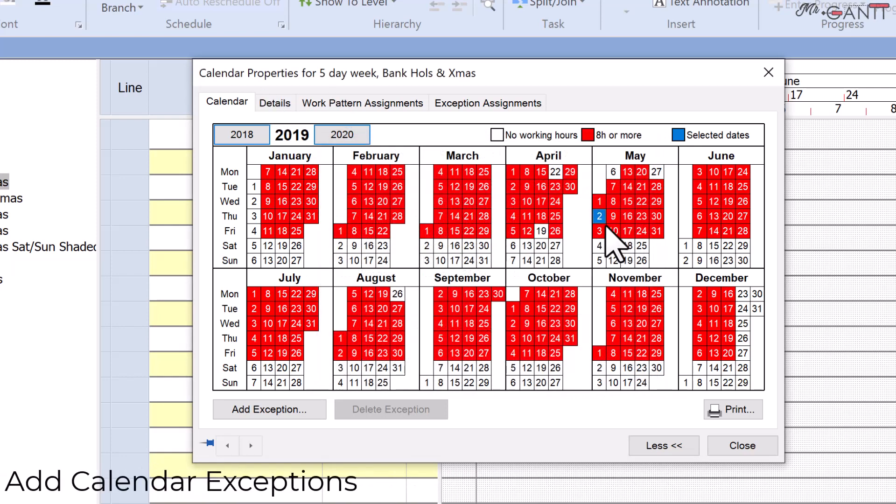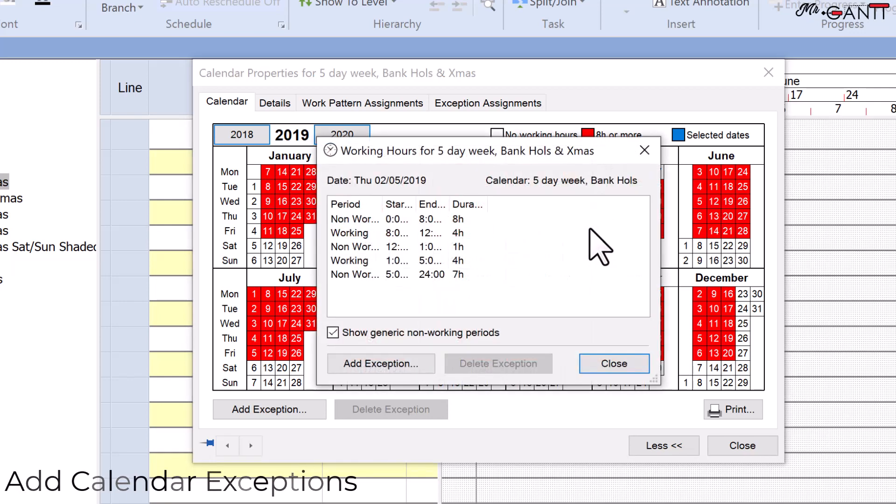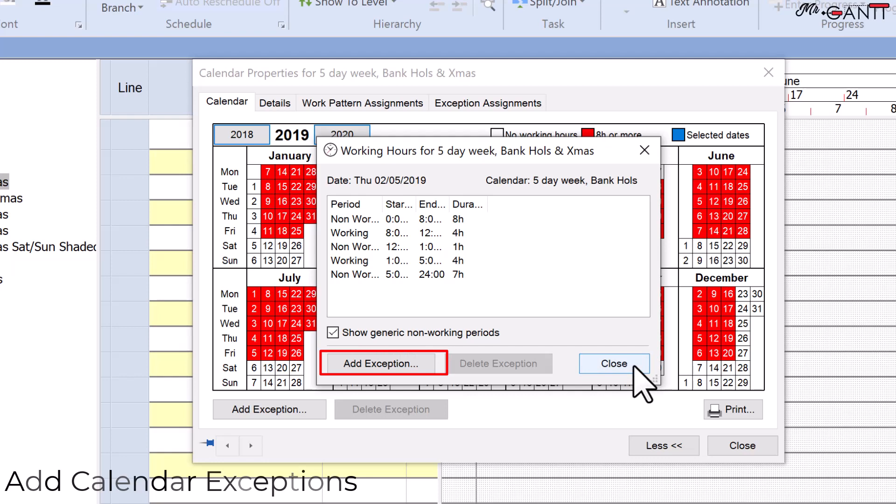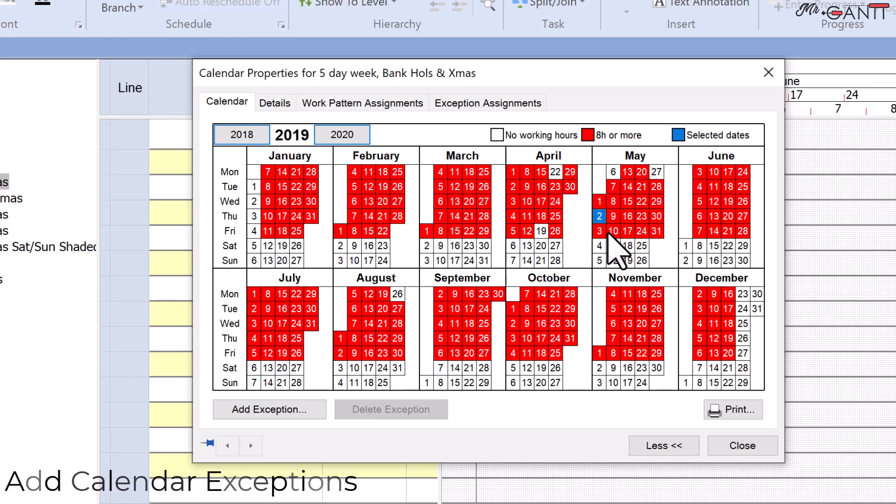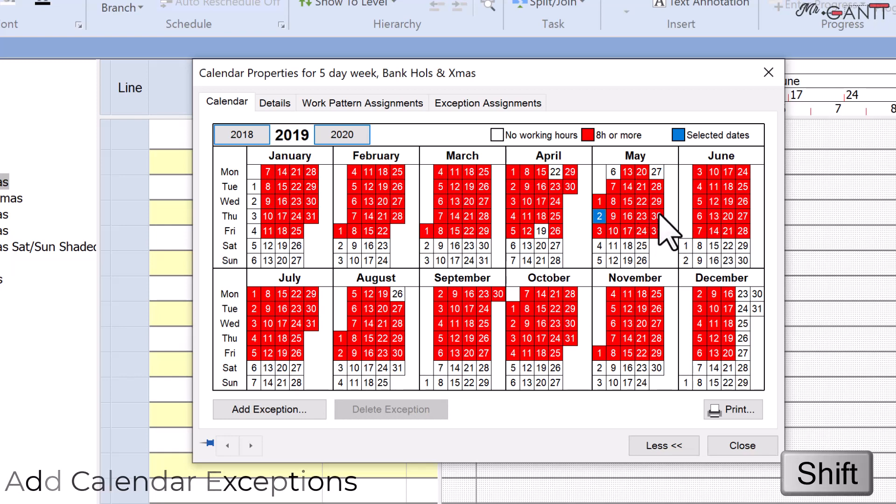To begin, pick the date or dates to which you wish to add an exception on the calendar tab of the calendar properties dialog as shown. To add an exception to a range of consecutive dates, click the first date in the range, then click the last date while holding down the shift key.